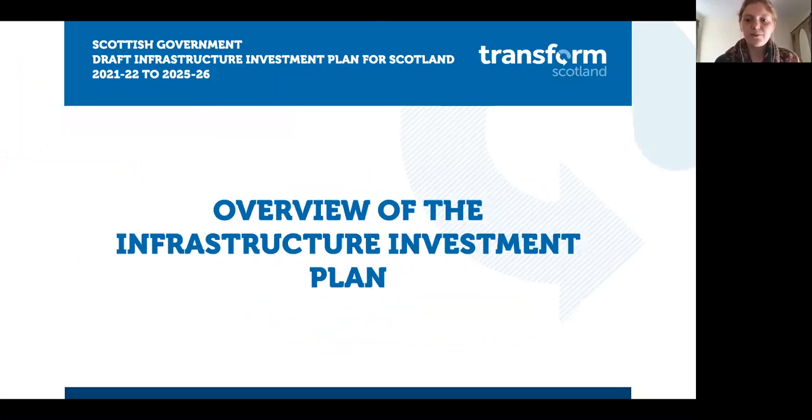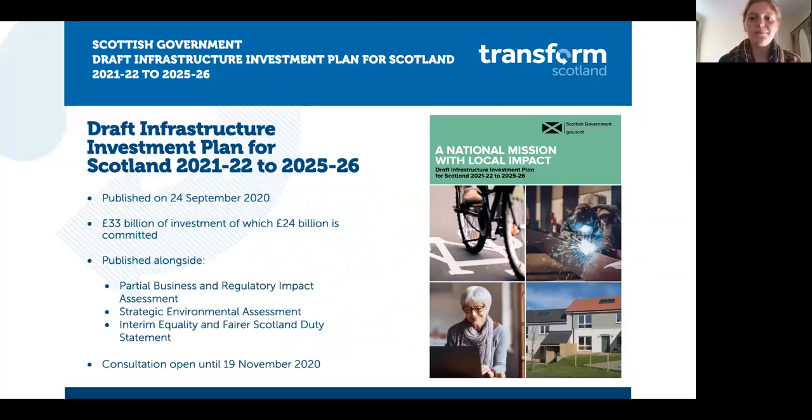So to start out with the overview, the draft infrastructure investment plan 2021-22 to 2025-26 was published on the 24th of September. So exactly 2 weeks ago now. It contains 33 billion pounds of investment, of which 24 billion have already been committed. And it was published alongside a partial business and regulatory impact assessment, a strategic environmental assessment, and an interim equality and Fairer Scotland duty statement.